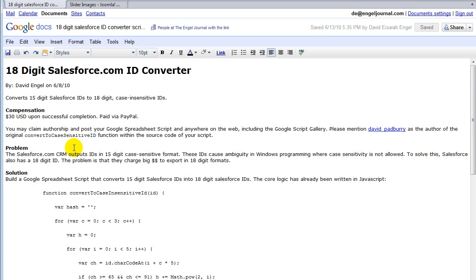It's really a pain in the ass for a programmer outside the country who barely speaks your language to, in the middle of their project, get some change. And it's really a pain for any programmer to get that from a client. So you want to make sure it's very clear up front. That will keep your costs down. And if you do have changes and you do want your program to evolve, that's fine. Just make it a 1.1 or a 1.2. But give them an end in sight for this first statement of work.